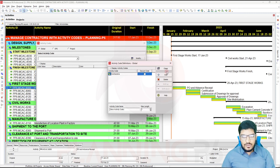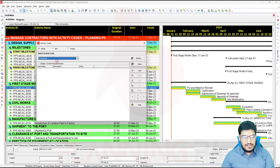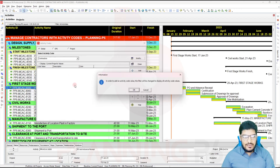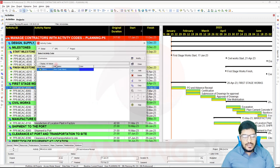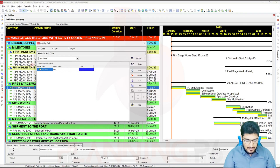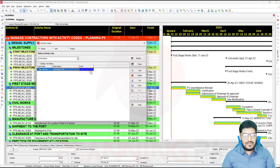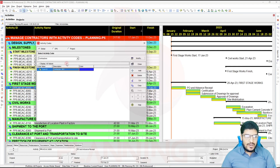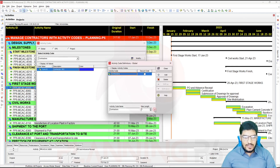I will close it. I will select 'Contractors' and then I will add the activity code values. There are no existing values as I deleted them all. The new code value — the code value is what will show during assignment. I will say 'Contractor ABC' or '001', whatever name you want to use. Color is for grouping and sorting purposes so you can see it visually. I will modify here — you can extend the length of the code from here. The code length is maximized up to seven by default.